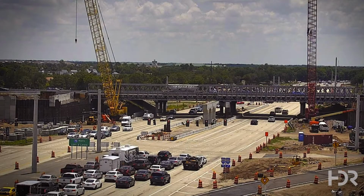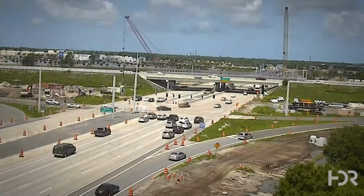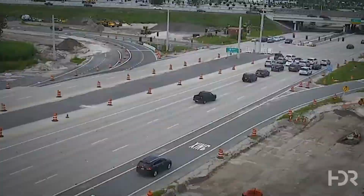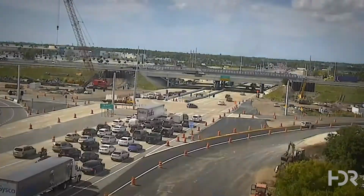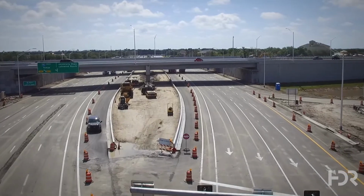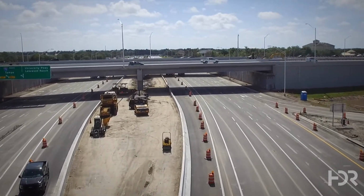By using the largest ACROW bridge in FDOT history, the team shifted traffic off the Interstate 75 bridges one at a time, allowing accelerated demolition, faster construction, and maintained safety. Construction was further expedited by eliminating temporary critical walls by using steel sheet pile walls in the permanent location. This enabled faster removal of the second existing bridge so that DDI crossover work could be accelerated. After construction plans started for University Parkway, FDOT made plans for 3 more DDIs along Interstate 75 in Sarasota County. University Parkway's success gave FDOT the confidence to pursue additional DDIs across the state.